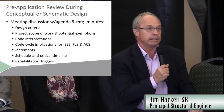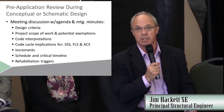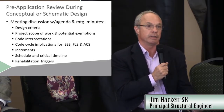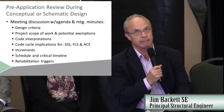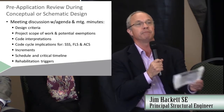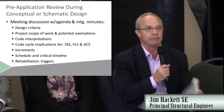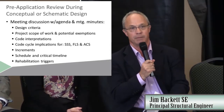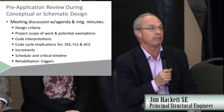We're getting very close to being done with our package for the 2019 CBC that will then be submitted to the Building Standards Commission for adoption at the end of this year. So if they're adopted, let's just pick a date, January 1 of 2019, they'll be effective January 1 of 2020. Don't forget, the administrative regs will be effective approximately February of 2019. So that's the tricky part about the code and how they work.